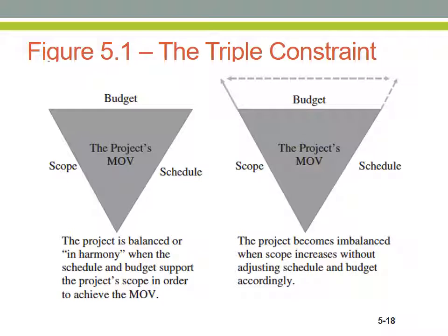And then we're going to put together a change request in order to adjust our scope so that we can ask for any extra funding or for any extra schedule that it will take to complete the project on time. That is the typical acceptable way of introducing extra scope into your project. In other words, it takes an approved scope change management process in order to adjust scope so that budget and schedule can also be adjusted.